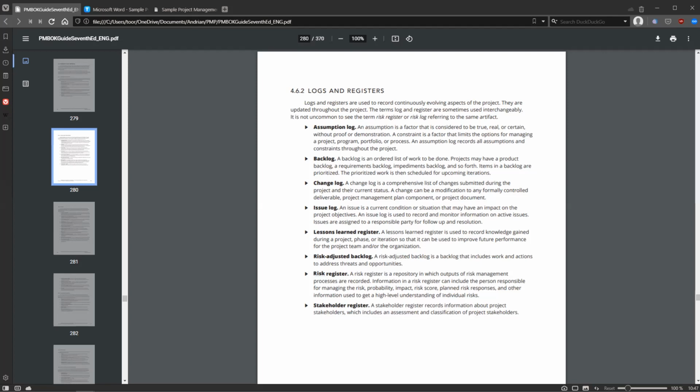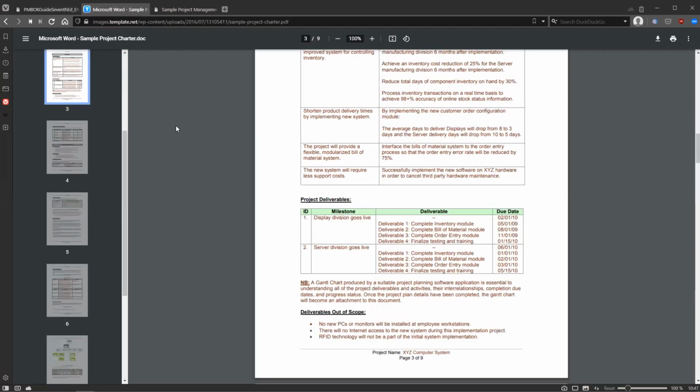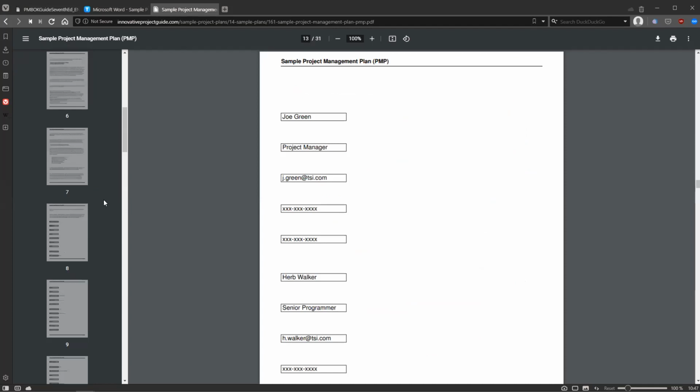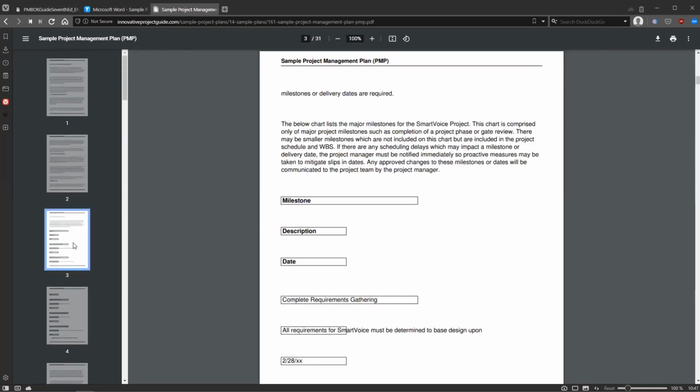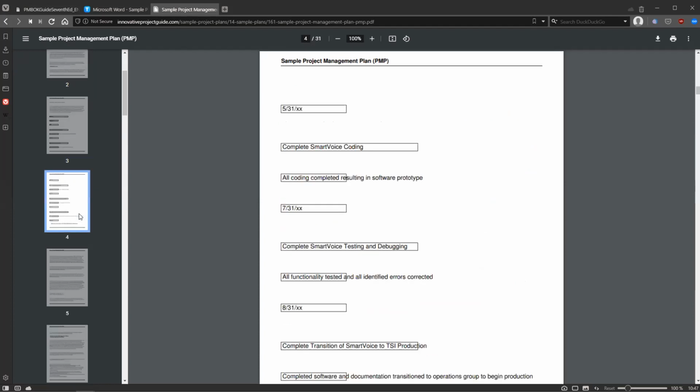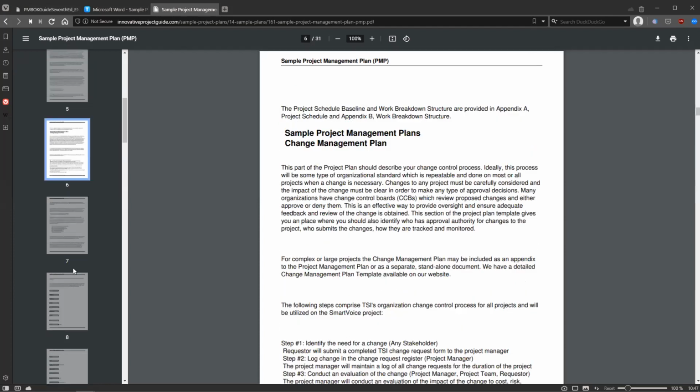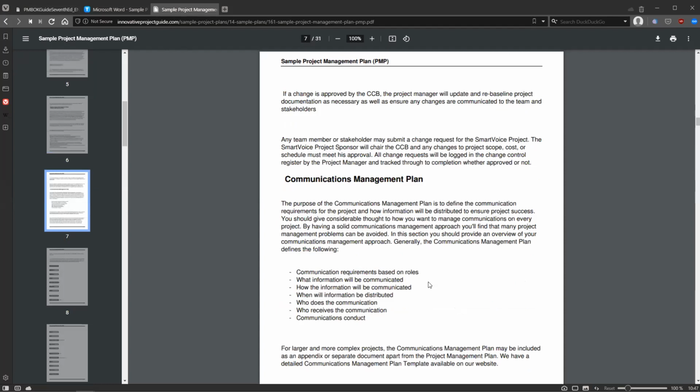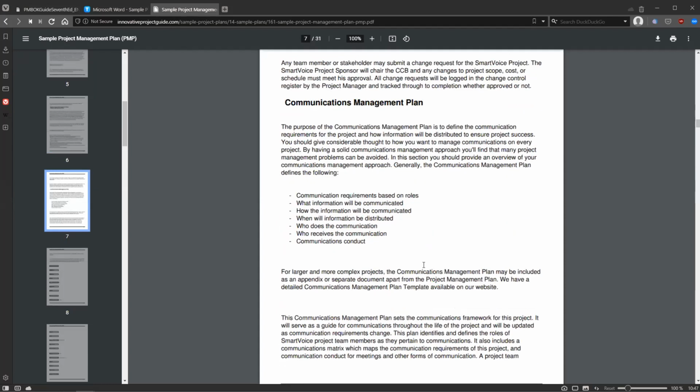And let me see if there's a good example here. So you basically identify the roles of every stakeholder within the project and define what kind of communication each role requires, or maybe even individual. Like every individual might have a separate communication requirement. You define what information you want to share.